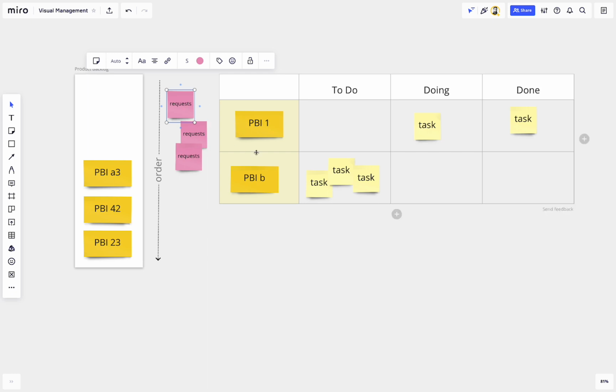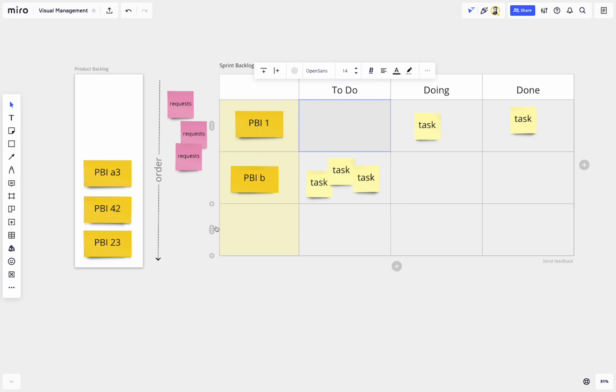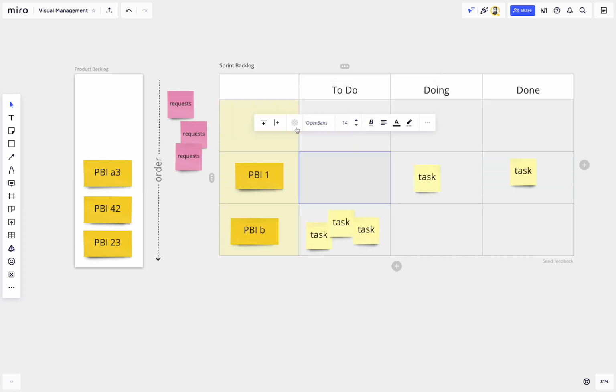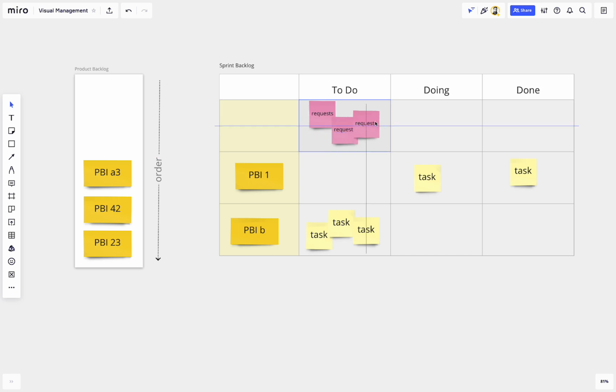Let's say that this cannot wait and is the highest priority. This is what we have agreed so far with the team. This is part of our legacy. We need to do this, right? So the one thing I'll do here is to create a lane for it and just start populating the lane with those requests. Those are just things that we're going to do.